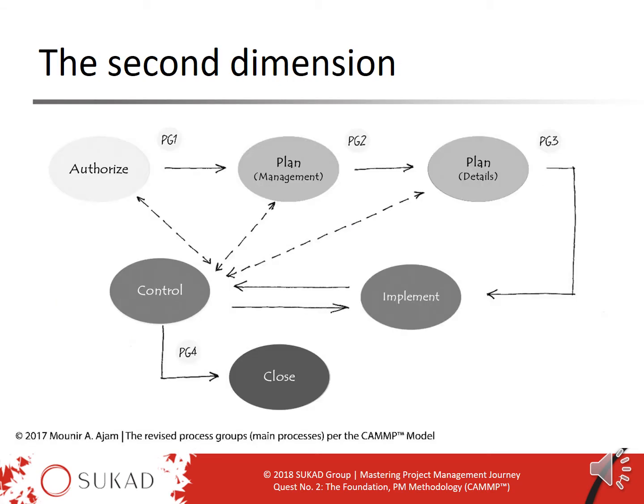As we cover the project lifecycle, dimension 1, and the functions, then we have the second dimension, and you remember we mentioned that each phase or stage must be managed at the second dimension, depending on the size and complexity of the project, especially for moderate and medium projects and or large and complex ones. And here we have adopted the second dimension from ISO, where ISO has what they call the 5 process groups. We modified this and made them 6, and we slightly changed the titles and the names.